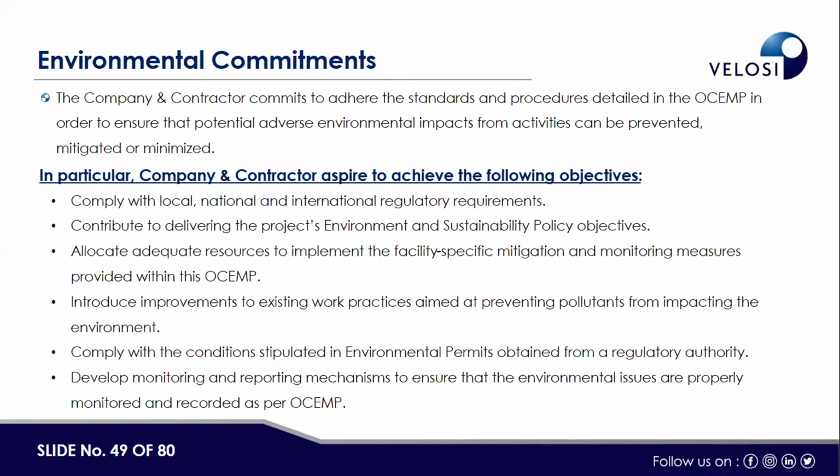Is there a guideline on the frequency of conducting environmental audits during the project life cycle? See, again, it depends on the local authority. If I talk about our region, UAE or Abu Dhabi, there is a minimum of a quarterly audit required by the local authority, on the basis of which the audit should be carried out for the development project, for the construction. But for the operation, it depends on the authority again. While issuing the NOC, they define the frequency of the audit, either quarterly, biannual, or annual.